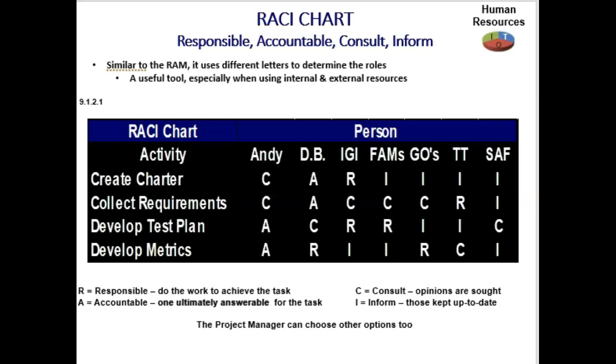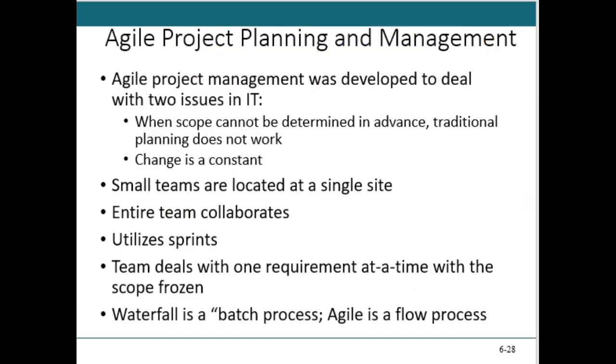Another response. Notice on line 3, there can be more than one that's responsible. They all might have responsible pieces, but on every single line, there's only one person actually accountable for getting it done. That is the key to the RACI. And you see it broken down by activity, as opposed to a RAM I mentioned, which is a little higher.